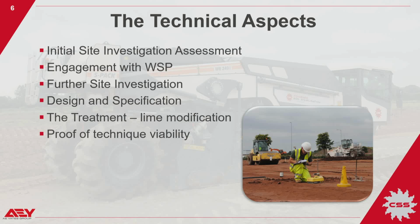Following design testing, discussions were then held with Seddon Construction, with technical assistance provided by the CSSL and WSP team, with Premier Guarantee, the building warranty provider, as stabilised solutions are not by any means the norm within the residential sector. They are, however, widely used in the logistics and distribution sector for warehouse floors and external works where loadings and flatness requirements far exceed those required in residential developments. Both CSSL and WSP have extensive experience in this sector and were convinced that the lime modified option was entirely appropriate for this project. Agreement with Premier Guarantee was achieved with a lump sum price proposed and accepted.